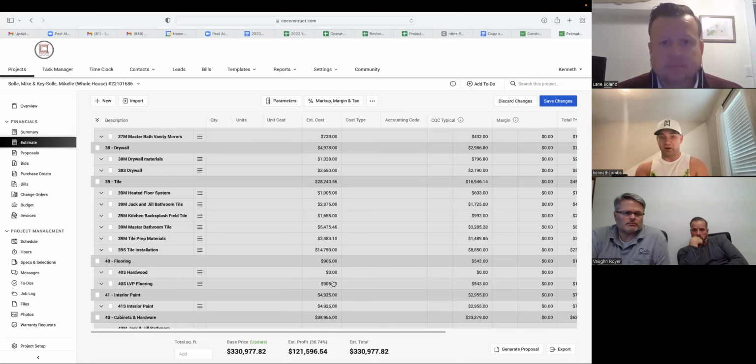Now they're motivated to say, we're running tight on this job. It looks like we're going to be a little under. Why don't I look for opportunities for change orders for this client? Because our change orders are higher GP than our other work. So it increases not only the job size, but it raises that GP up a little bit, gives them a little bit of cushion, and they're getting more money because they're getting paid out of the GP.